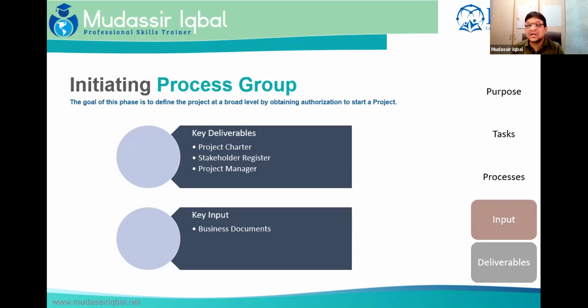The inputs to the project charter are normally documented decisions and can include the contracts where applicable, the project statement of work, because we will see once we go into procurement that you will actually change your role, that we will be issuing the procurement statement of work. So this is from where we receive some RFIs or RFPs. That is a project statement of work. Details of organization cultures, guidelines, policies, procedures. This is normally written by the project sponsor or whoever initiated the project. If the project is external, then it will be written normally by the buyer. So the charter is the one.